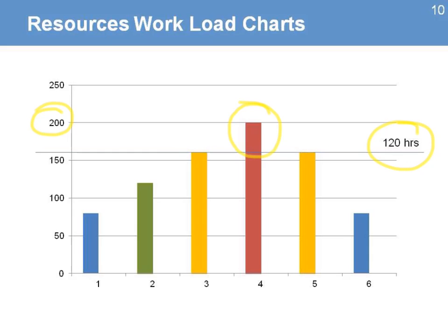Anyway, the idea is that when you over-allocate teams to more work, the result is usually poor quality in the outputs of that activity. There are also going to be problems with motivation. There are going to be people not being happy with their jobs, and that brings back some of the initial problems you had when you were building the team. You now have a team that is at a high level of performance, so make sure that you identify that limit and that nobody is beyond that limit or even below that limit.